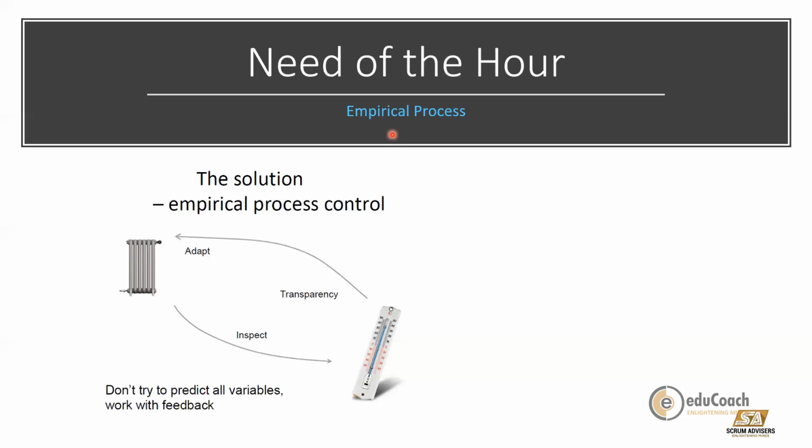We break down work into smaller slices. As Elroy was saying, that is the question I asked him. We break down work into small slices of work, maybe 2 week to 4 week duration, and we try to iterate and create increments which can be shown to the customer so that we can elicit feedback, and we know that we are working in the right direction. We know that we are going where we want to go and not adding features which are not required.